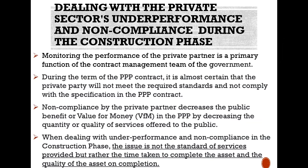Dealing with the private sector's underperformance and non-compliance during the construction phase. Monitoring the performance of the private partner is a primary function of the contract management team of the government. During the term of the PPP contract, it is almost certain that the private party would not meet the required standards and not comply with the specifications in the PPP contract. Non-compliance by the private partner decreases the public benefit or value for money in the PPP, decreasing the quantity of services offered to the public. When dealing with underperformance and non-compliance in the construction phase, the issue is not the standard of services provided, but rather the time taken to complete the asset and the quality of the asset on completion.